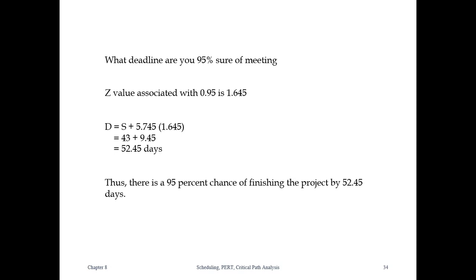So in short, the PERT analysis will give you the probability of completing a particular job, but it's not giving you any kind of assurance that this particular project is completed within an estimated time.